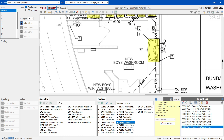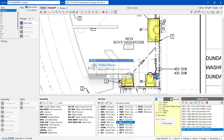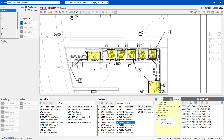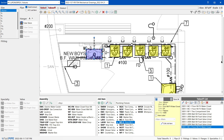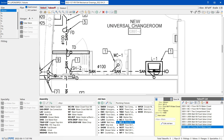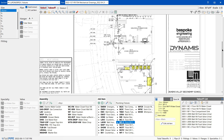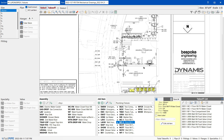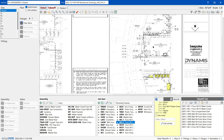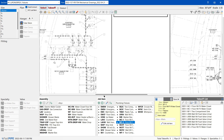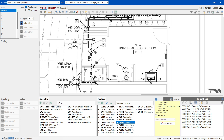Now this is quantified. I'm not worrying about any pipes - I could also do flow rates and clean-outs but we're not working on that now. Right now you're just assisting a senior estimator, just doing a takeoff for him. Make sure you don't miss anything - that's the most important thing. A toilet can cost between two-four hundred dollars, or it can be eight thousand dollars, or even twenty thousand. The cheapest thing is three hundred dollars so make sure you count right. When the senior estimator goes through he'll catch anything you miss. This drawing is a little weird where they show you the demo and then the new.